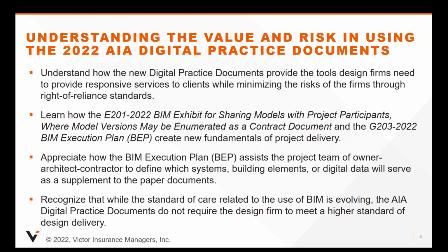And although we cannot go into the BIM Execution Plan prototype in detail, I want you to appreciate how a BIM Execution Plan, which the parties sharing the digital information commit to following, can define exactly what, when, and how information will be shared. I also will discuss the standard of care, and while using the digital information has been evolving over the last 2 decades, this new series of digital practice documents does not, by itself, change the standard of care for your professional services in any way that is unmanageable or unintended by your negotiated contract with your client.